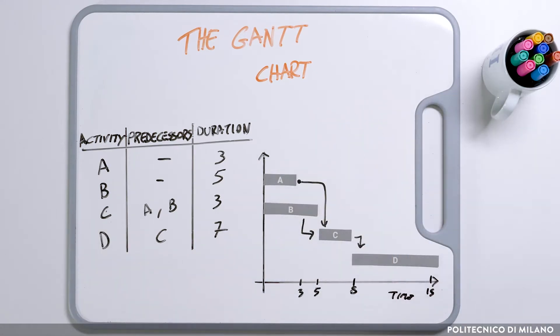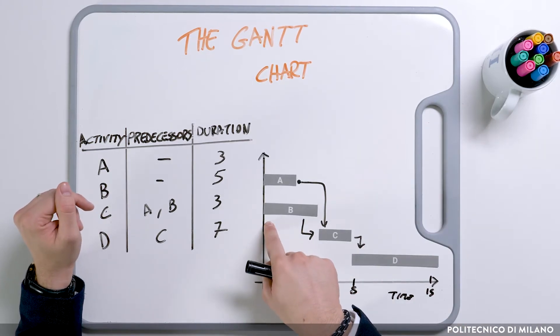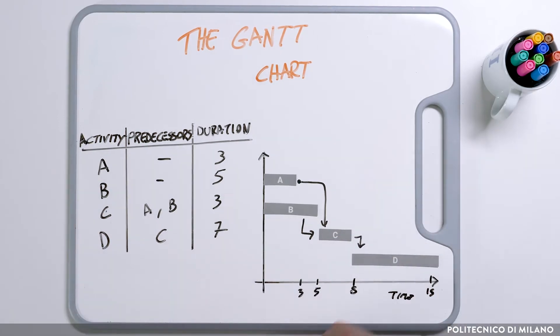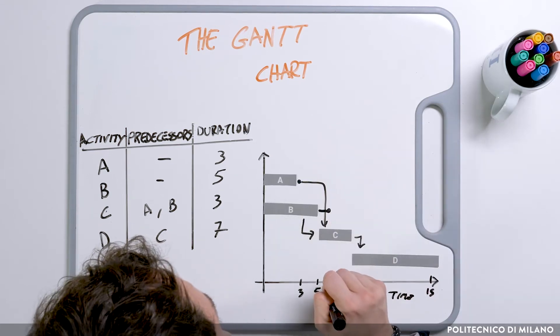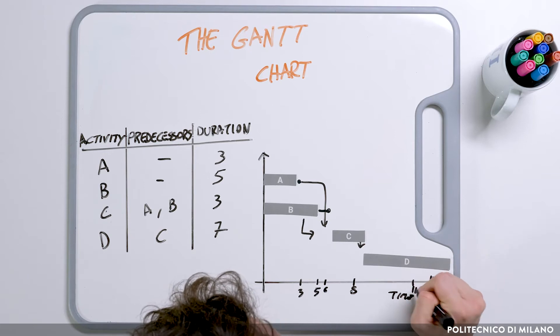In that case, normally we use a line. For example, activity A actually started at 0 and finished at 3, so we have a point representing that the activity is finished. If we take B, which also started at 0, we may realize it didn't finish at 5 but lasted one more period and finished at 6. Activity C had to start at 5 but started at 6, and had to finish at 8 but finished at 9 instead. Activity D started at 9 and now we are at time 11.